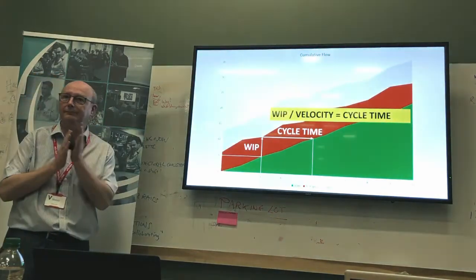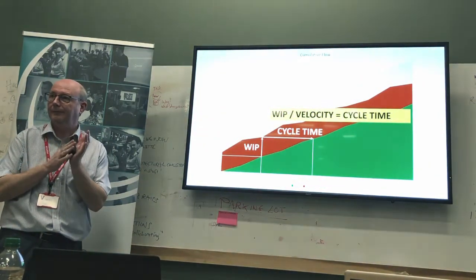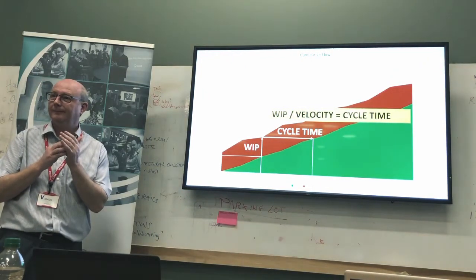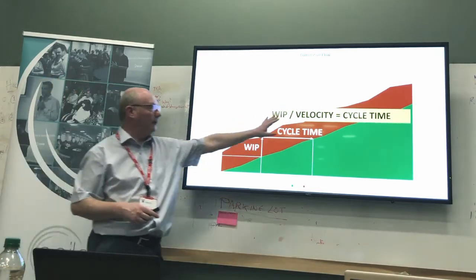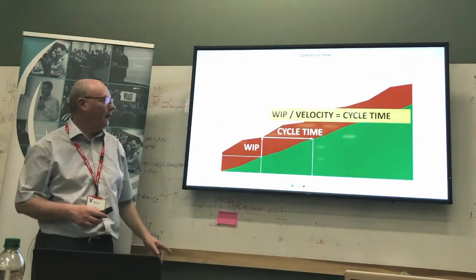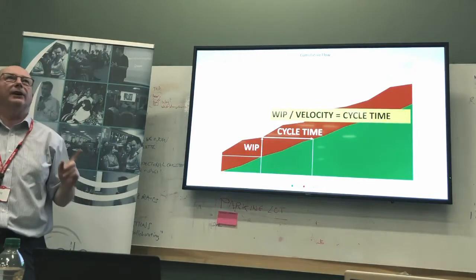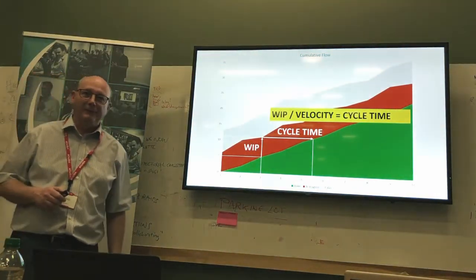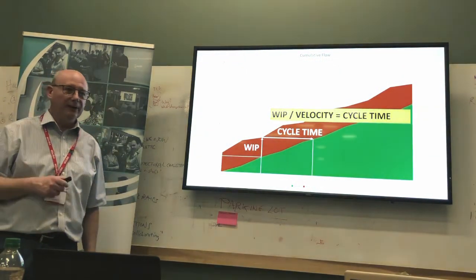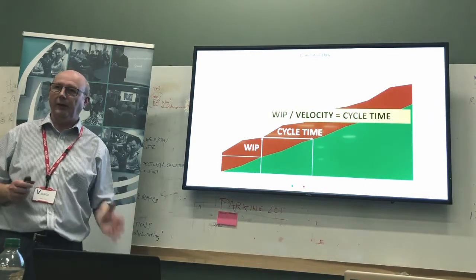Anybody? So you can use to predict your forecast, your next lot of work. Kind of. That's actually what we use velocity for. Cycle time is how long does it take us, if we talk the Kanban ideal of I've started so I'll finish, like Magnus Magnusson, right? To avoid task switching, if you say, well look, once I've started something, I'm going to finish it.